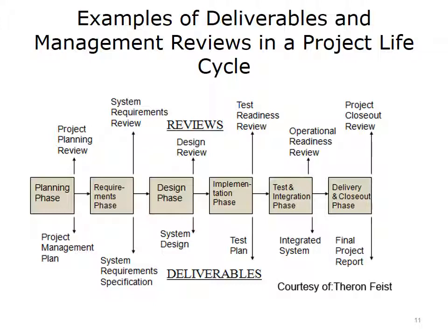Again, some of the deliverables just reflect logical activities being performed during the particular phase, such as the result of the implementation phase, would certainly involve code for the system as well as a test plan, so that the test plan would be an important deliverable from the implementation phase that you could review. And this would help ensure that your team is ready for the testing phase that follows.